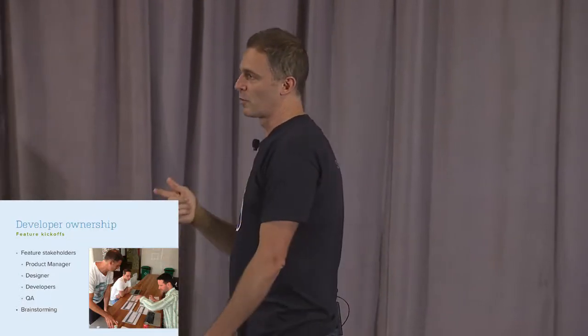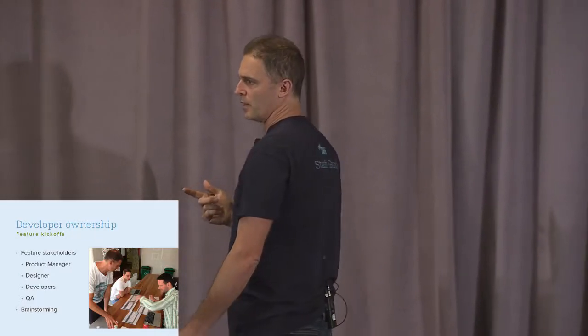One out of every five weeks, when we say we've got a 5-week release cycle, one of those weeks, we're not working on the backlog. We're working on whatever the developers want to work on. As a result, in almost every release, 90% of our releases, I think, we've had features that have either been initiated, thought of, spiked or prototyped during Innovation Week. A lot of them have actually been completed and put into the product during Innovation Week. These have added to the fact that we've always had something to put out in a release.